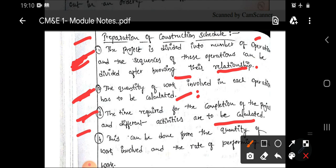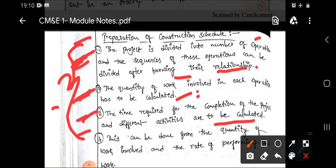Combining the durations of all the activities involved in my project, I can get the entire duration of the project. For the first activity I require 2 days, for the second 1 day, for the third 15 days, and for the fourth 3 months. Depending upon the quantities, I will calculate the time required for each and every activity, then add those durations to get the total project duration. This is the preparation of a construction schedule.